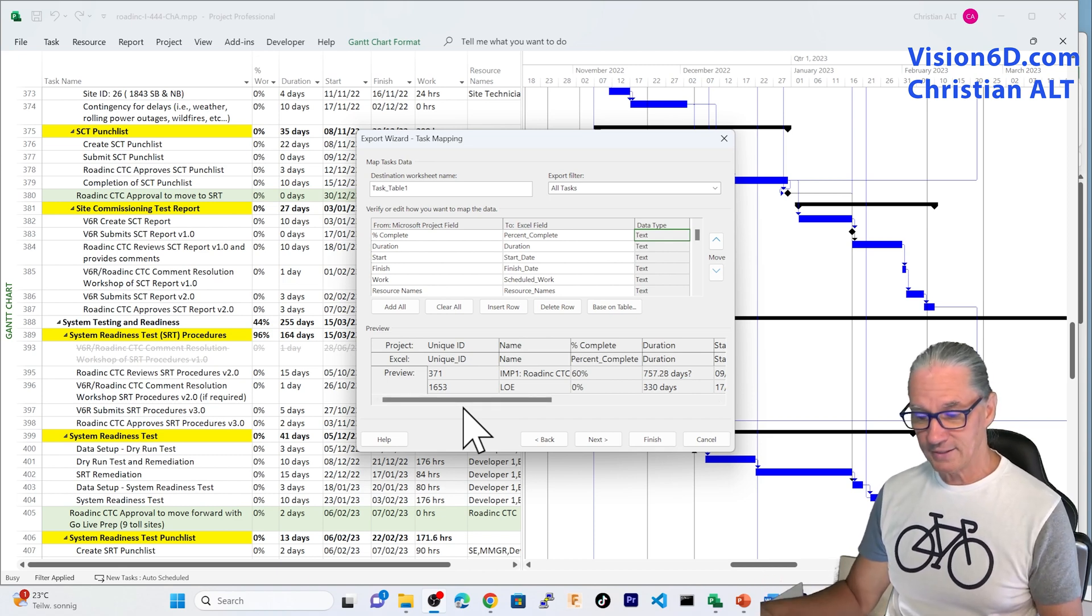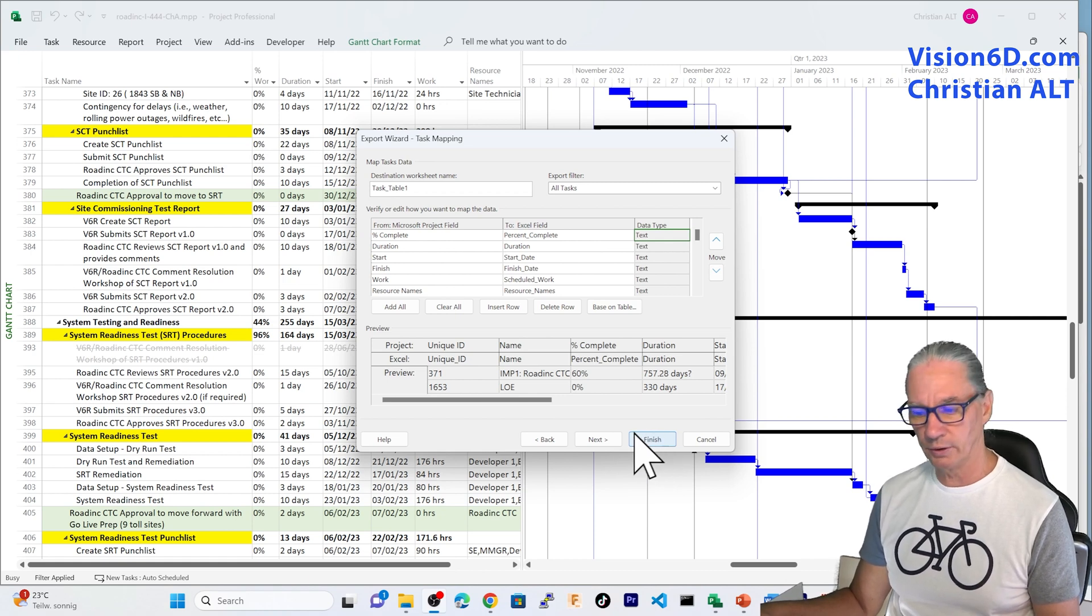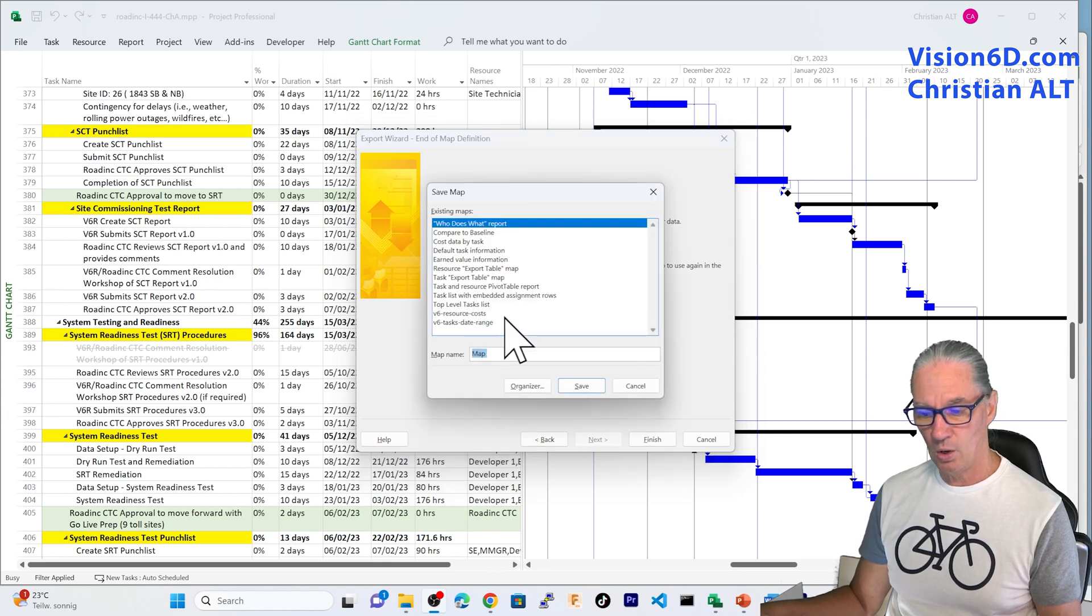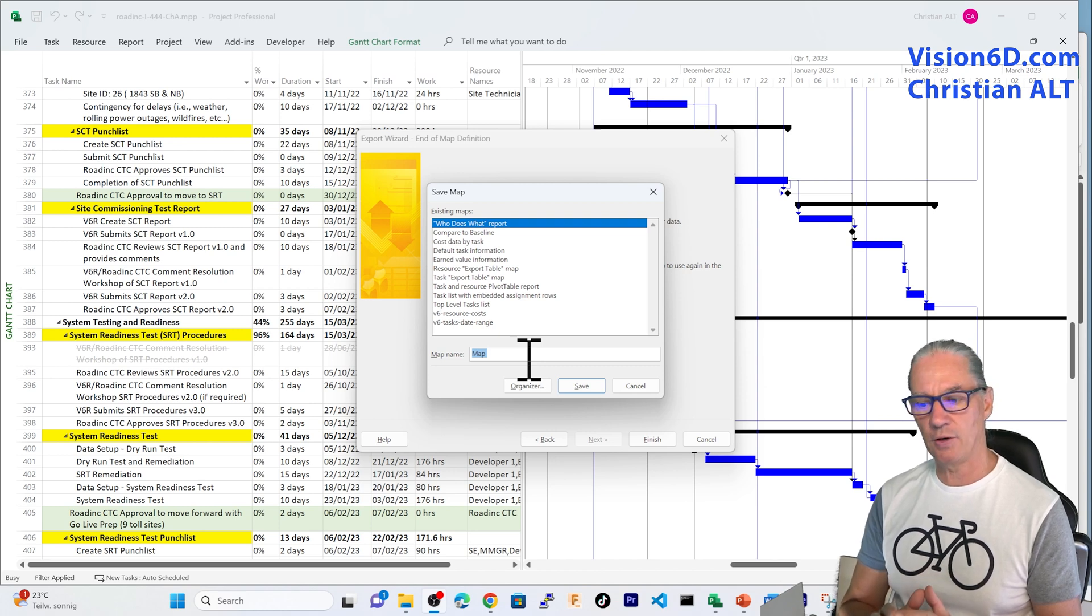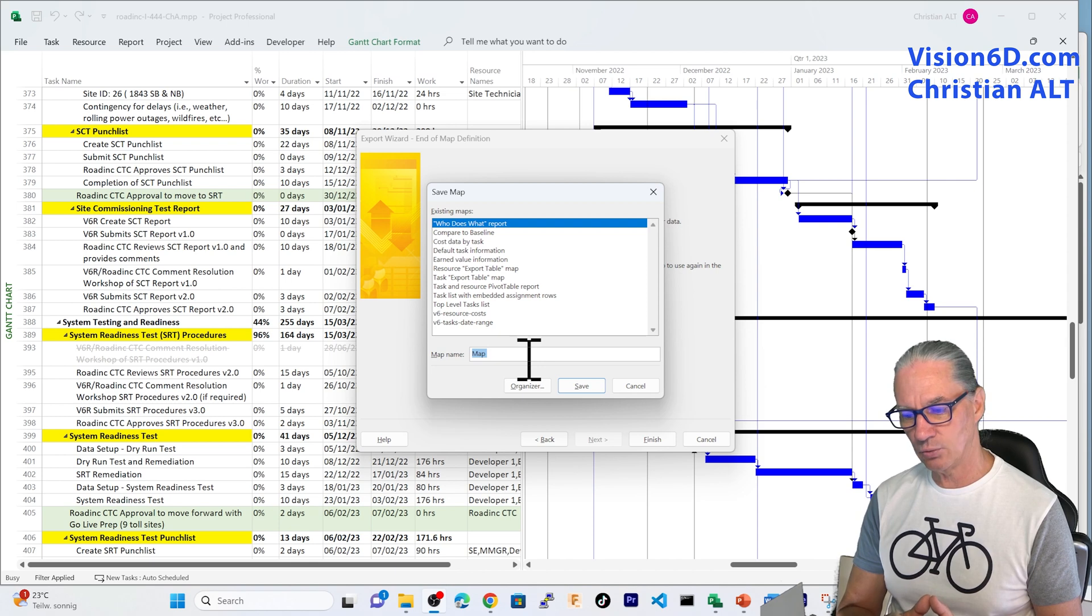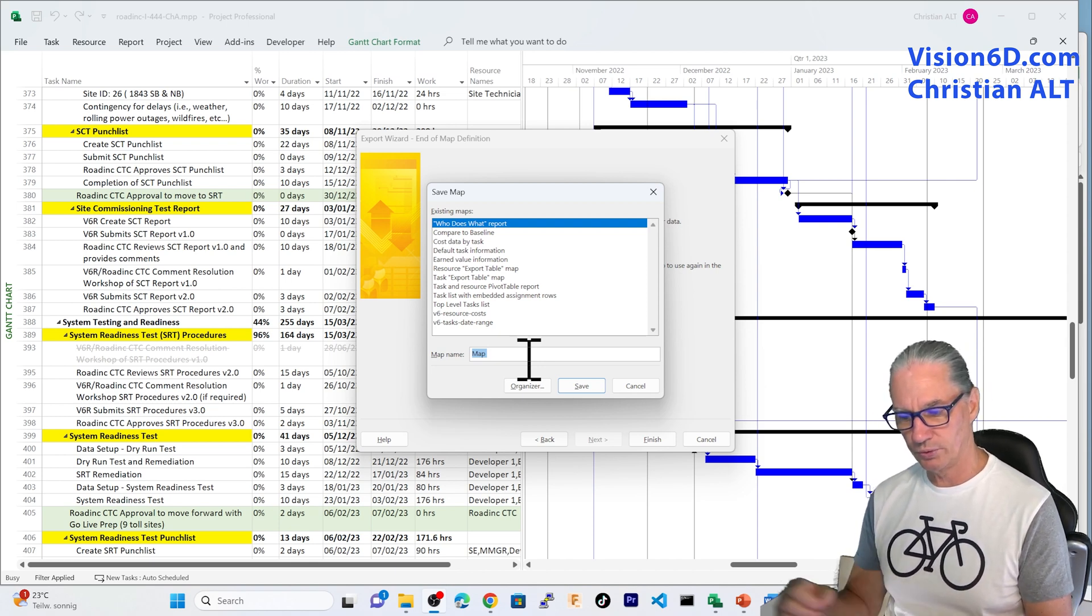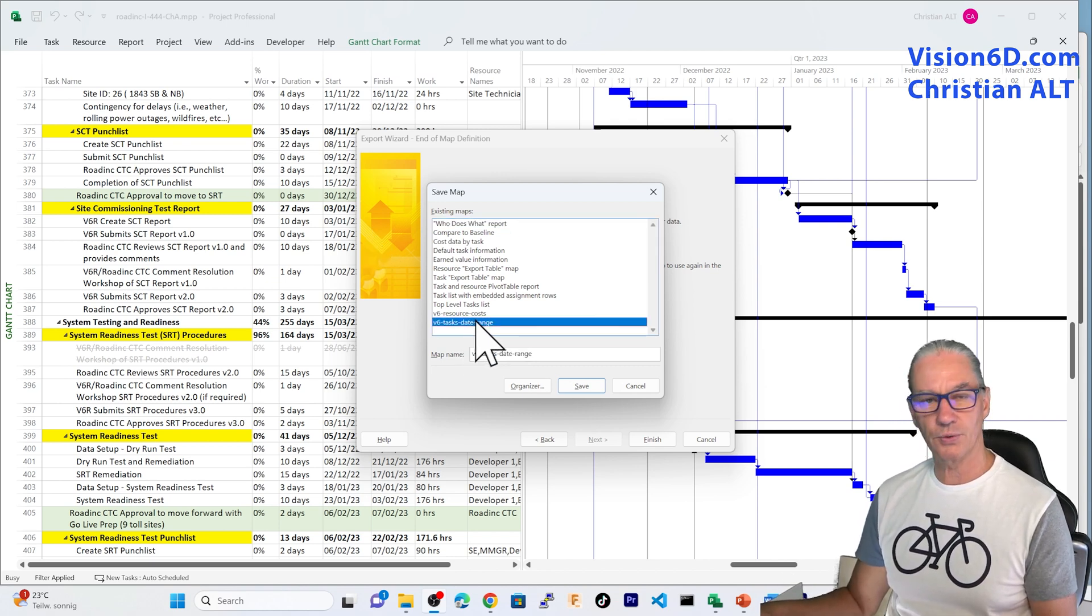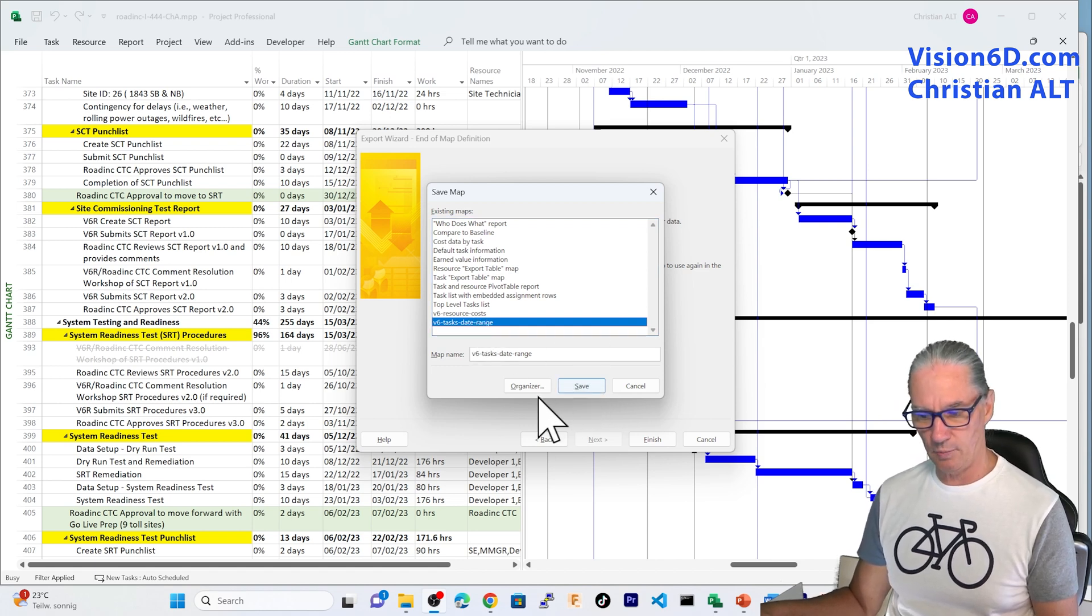So, with that, now what I'm going to do, I could click finish and we could move on. But I'm going to go first to next. And you see that I went to next because now my work, I can save it. Because every time that I want to export data in that way, you will see that you have to go again through the map. So, I had saved it already in a certain map here. So, I'm going to do the same.